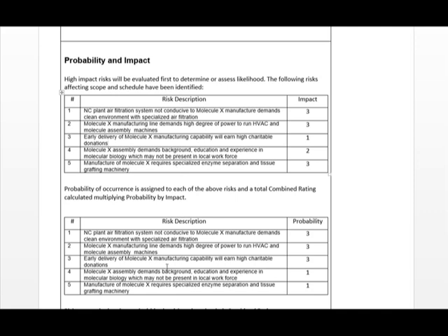I've gone further with the probability of occurrence. Probability is very high because the manufacturing facility was built out without recognizing the need for a clean room manufacture.